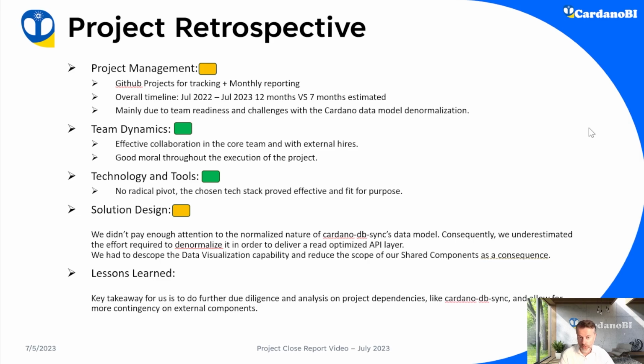We had to descope, unfortunately, the data visualization capability and reduce the scope of our shared components as a consequence. Our key takeaway is to do further due diligence and analysis on project dependencies like CardanoDB Sync, and allow for more contingency on external components.